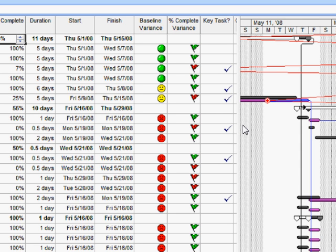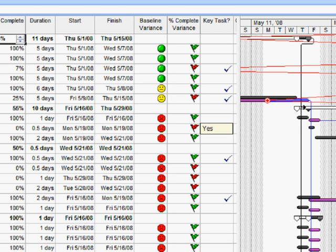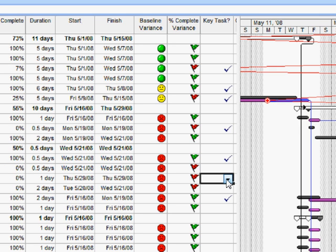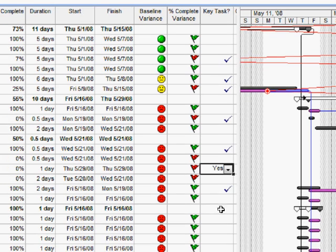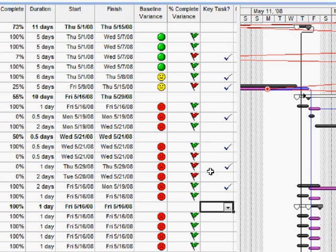However it may be that not all the tasks are of equal significance to us. There may be particular tasks in here that we're really concerned about. And so a project manager can go in and flag tasks as key tasks using another type of indicator here, an indicator that they set. Let's say that they want to now make this task here a key task. They just click, drop down and select yes, and now that task will also show as a key task.